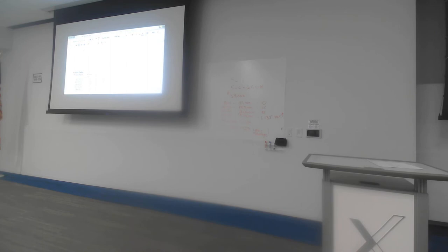Again, I'm going to keep track of how my project paths are looking. So any of these paths that contain the activity E, they're all going to reduce by 1 day. So the critical path, obviously that has E, so that's going to reduce from 18 down to 17. This path here doesn't have E, so that stays at 14. This path here does have E, that goes from 17 down to 16. This path doesn't have E, so that stays at 11. And the last path stays at 15. E isn't on that either. So again, keeping track that, yes, my critical path is still the same. Yes, it is. So I can keep going.